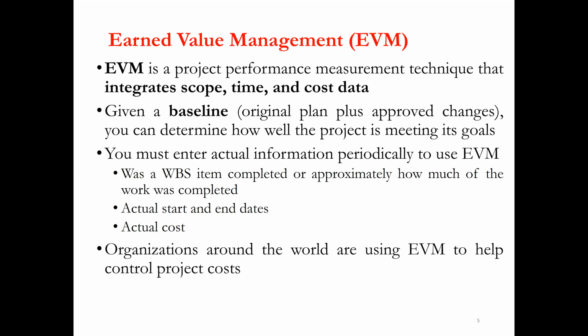The earned value method is a project performance measurement technique that integrates scope, time, and cost data. So in this we will integrate the scope of the project, the time of the project, and the cost of the project, given a baseline, like the original plan plus approved changes. So the baseline is always our original plan plus approved changes. Then you can determine how well the project is meeting its goals.